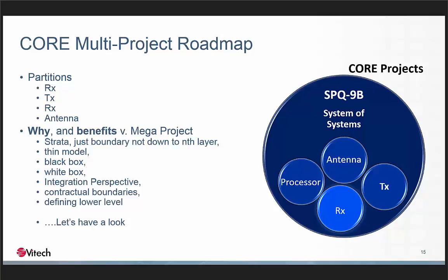We're going to be very deliberate in defining what the interfaces are, what are the physicalities. I remember years ago there was a discussion about two subsystems that were supposed to work together. Initially it was a parallel connection. Over time they found an issue with the parallel and changed it to a serial. One of the subsystem designers came back and said, we would have been happy to make that adjustment if only someone had told us. So what you had is one subsystem required a parallel connection and another a serial. Doesn't sound like that big a deal, but it costs a lot of money to reverse engineer out that capability that would have been very clear if we had been able to communicate the information to all the different stakeholders.